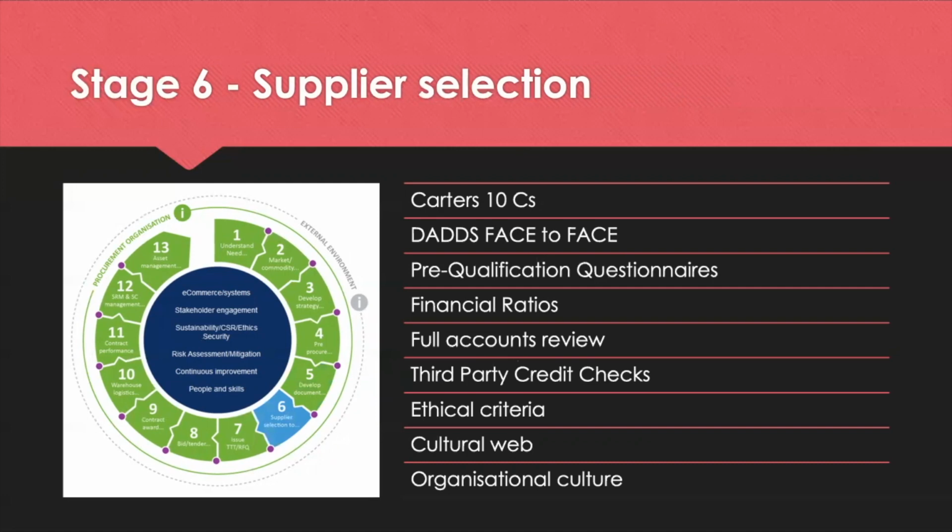A lot of this is about the bidder, not the bid itself. You're pre-qualifying people. And ranking some of these performance qualifiers against the business needs can help you make sure of what's more important to you. Is it their experience in a certain area that's vital? Give that a higher weighting than their financials, for example.